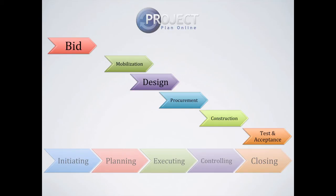You're certainly going to have some end-to-end phases, maybe from procurement to construction into test and acceptance, but the likelihood is that these are all going to overlap as well. The point is that during each phase you need to identify what the hold points are before you progress to the next phase — that's the most important thing. You can have overlaps, you can have gaps, that doesn't matter. But before certain actions occur in the following phase, you must make sure your precursors are fully satisfied.